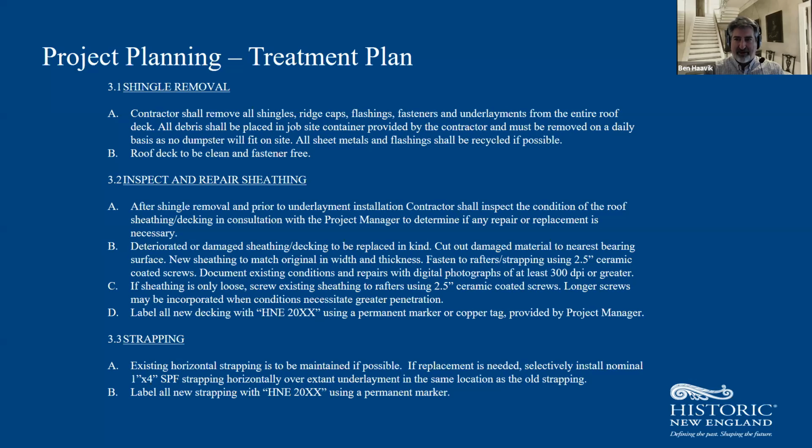And so I could go to that restaurant and get focaccia bread with rosemary-infused peanut butter, and my son is not going to be happy. And that's because I didn't specify what it needed to be. Likewise, you could give that scope to a contractor and say, I want you to replace the roof and repoint the chimney. And if you don't define what repointing the chimney means and what replacement of the roof means, who knows what you're going to get.